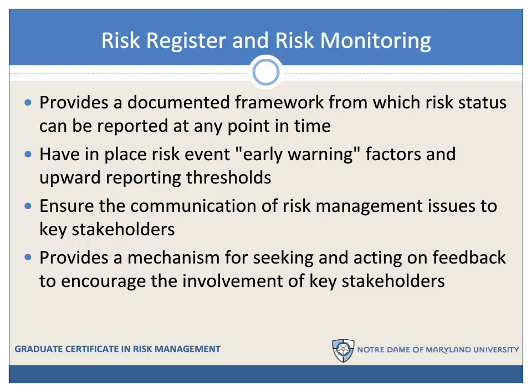Thus, when the risk register is initially prepared before the activity or project is begun, the risk register serves as a forecast of those risks that are of greatest concern. As the project proceeds, the risk register is maintained and updated, and so the risk register becomes a record of how certain risks are resolved and how new risks may be evolving.